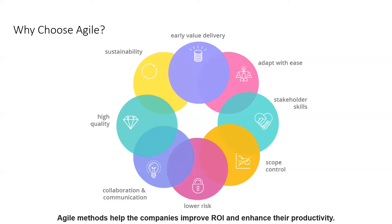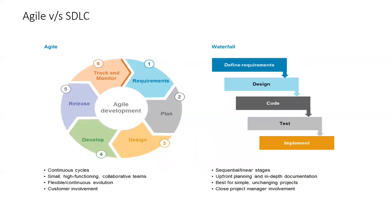Let's see the difference between the traditional method and Agile. Looking at the Software Development Life Cycle — the waterfall method — the process is sequential with linear stages: define requirements, develop a design, start coding, do testing, then implement. There is a lot of planning and in-depth documentation involved. It is best suited for simple projects that are not going to change — unchanging projects — and there is close project manager involvement at every stage.